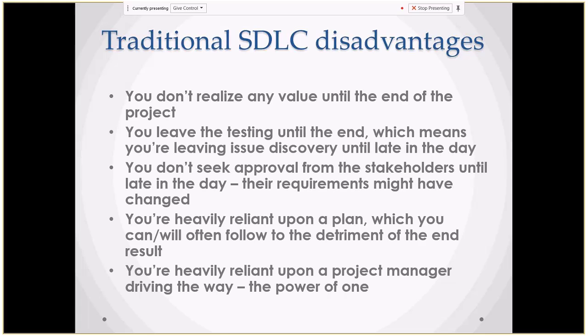You don't realize any value until the end of the project. Usually, we gather requirements, we prepare a software requirement specification (SRS), and then we agree on it with the stakeholder or the client. This is what we are going to deliver at the end, and then we develop. Once developed, most probably at the end, or maybe after 2 or 3 stages, we present. The requirement might have already changed, or maybe whoever gathered the requirement might not have understood exactly what the client needs. Likewise, there could be a lot of conflicts at the end.